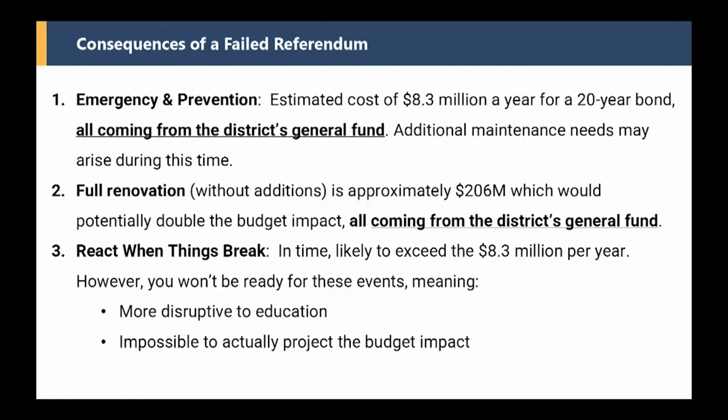And where would the modulars be? We haven't designed out where the modulars would go. We only did this as a first pass of what we think the investment would be. We would still have to model out where and how things would circulate, et cetera. Typically, you're going to put modulars in parking areas because you already have impervious surface. It's a good spot to put them.